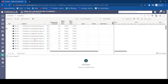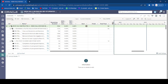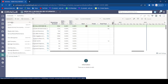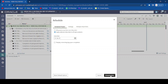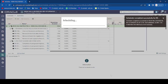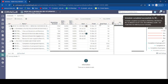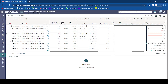All activities are now shown in the program. You can see columns like Activity ID, Activity Name, Remaining Duration, Schedule Percentage Complete, Performance Percentage Complete, Start, Finish, and Total Float. However, the Gantt chart is not showing any bar information yet. To fix this, go to Schedule — same as in the standalone application, press F9 or click Schedule Now — and the schedule will complete successfully, after which all dates and bars will appear.